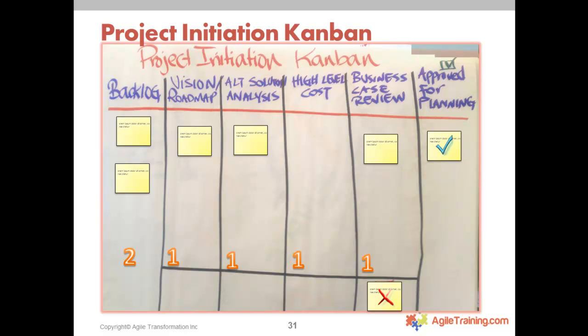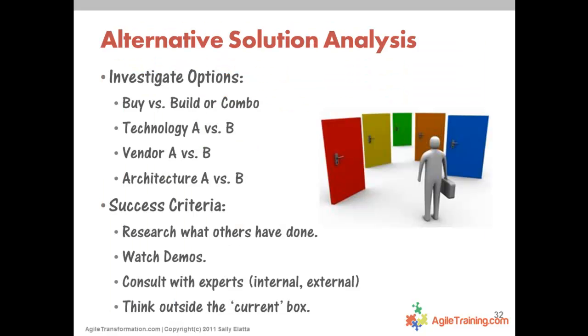And that's the multitasking hell that we're in, because projects are being pushed upon the teams, as opposed to when they're done with something, they're pulling your next priority. So that's why I say what this is really approved for, and maybe this should even say approved for backlog prioritization, because it really needs to be put in the backlog in the right order so that the next team that's available can pull it and get it done, as opposed to, again, stealing and robbing resources from every other project. I think we already talked about this.